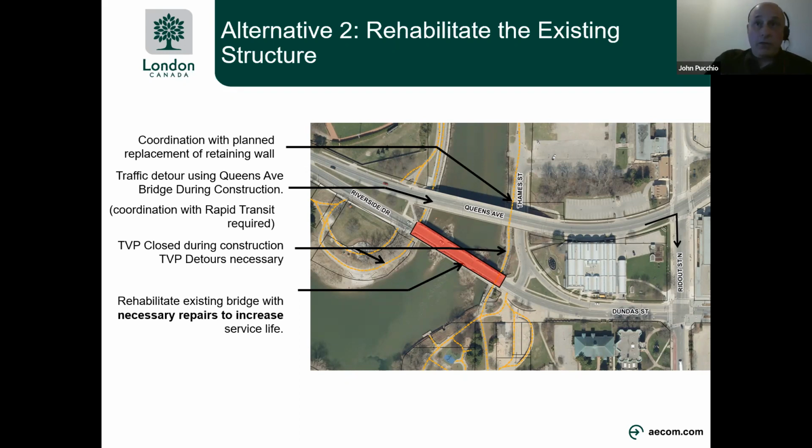There are leakage issues known at the expansion joints over the piers and abutments. That leads to further deterioration of the substructure itself, and those require replacement or repair through some other means. The bridge approaches require review and potential realignment to accommodate a minor grade increase, say, for example, if you replace the deck. We also need to address deteriorated and under capacity structural steel members with repairs to the truss and floor beams and other miscellaneous steel components. We need to address deteriorating structural steel in general through recoating. Need to address the condition of the bearings at abutments and piers, potentially through replacement. The lack of barrier protection system on the roadside as it relates to the trusses themselves needs to be reviewed.